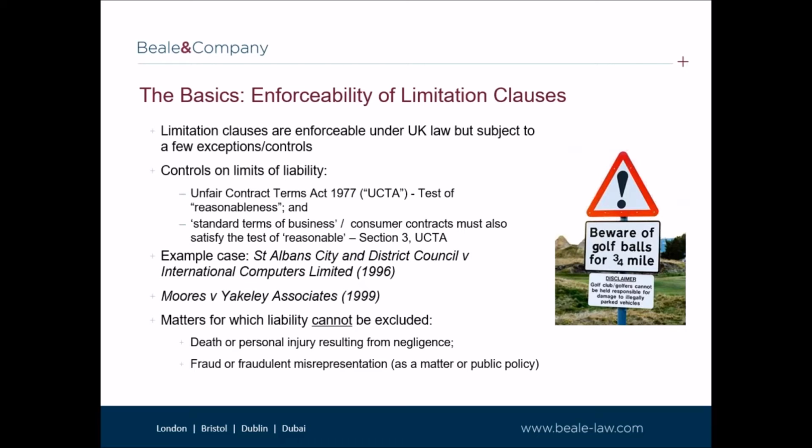Reasonableness is assessed on a contract-by-contract basis by taking into account criteria such as the bargaining positions of parties and the availability of insurance. For example, in the case of St Albans City and District Council and International Computers Limited, the court held that a limitation clause which sought to limit International Computers' damages to £100,000 was not reasonable. The court held this was because International Computer demonstrated no evidence to show that it was fair and reasonable to limit its liability under its contract to £100,000.